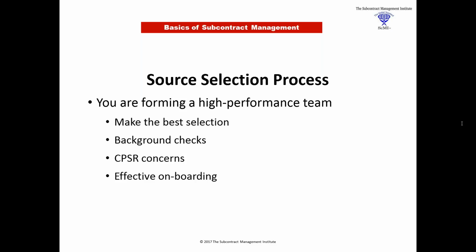we have found the best practice to be that you check references yourself. You find out who they've done work for. You get past performance data directly from people who have used their services. Now, who are they going to give you as references? Only the ones they've had superlative work relationships with. But a little bit of background checking can go a long way towards ferreting some of that out.